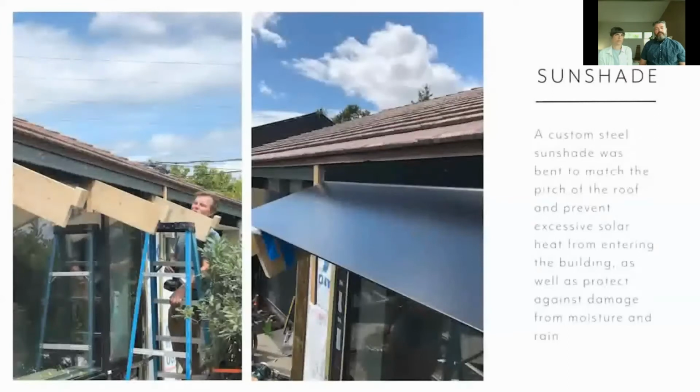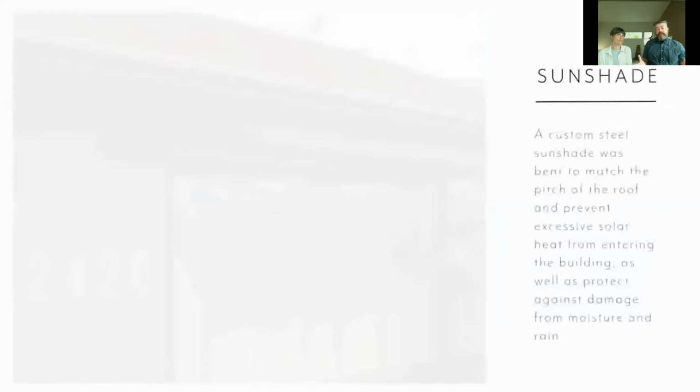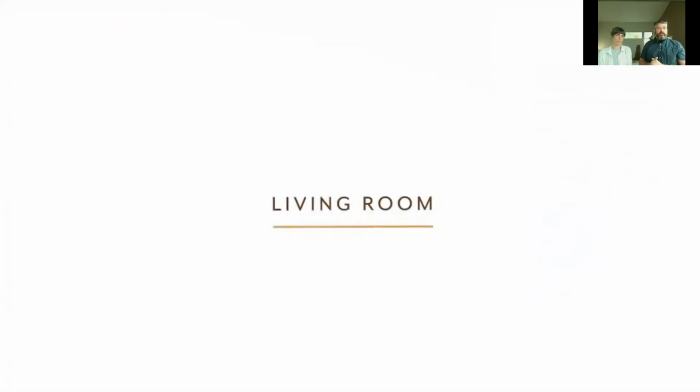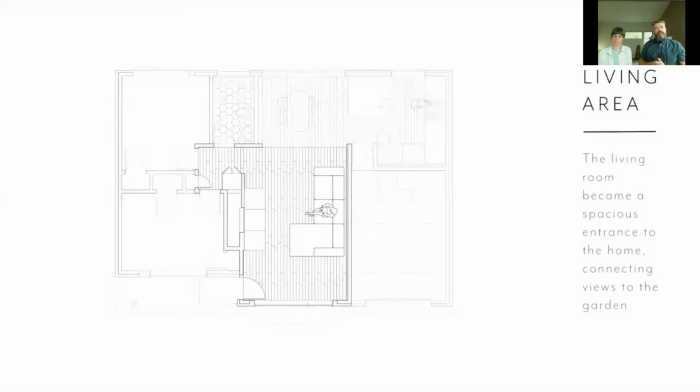In the schematic design phase, we were sort of back and forth about what the scope was going to be. And when we got to the place where it was expanded, the feedback was going to require earthquake retrofit and egress for the new windows. So the windows had to get bigger. And we needed to do an energy retrofit too. So this was kind of jumping in feet first on that.